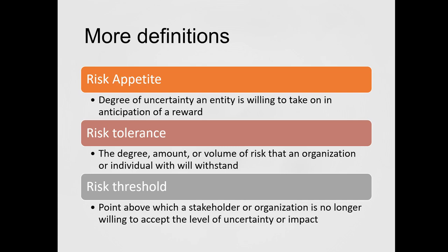As a project manager, you will have to identify in yourself what level of appetite, tolerance, and threshold you have, but also recognize that you will have to consider the stakeholder organization that you're working with. What are their thresholds, their tolerances and appetites? Because if theirs are lower than yours, you will have to adapt and go to their point. Whereas if theirs are way higher than yours, you have to be comfortable with having that much more level of risk.